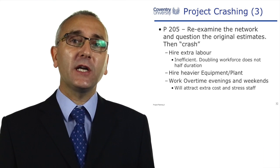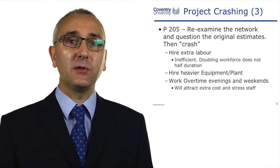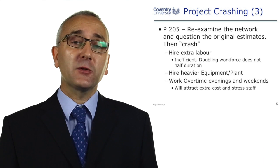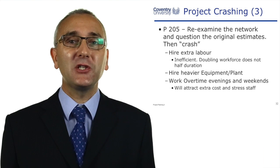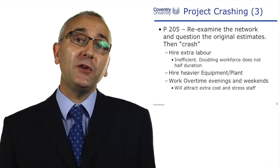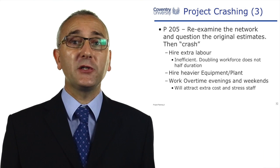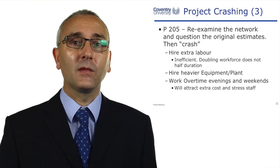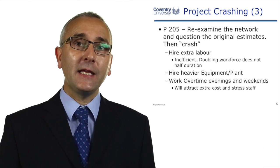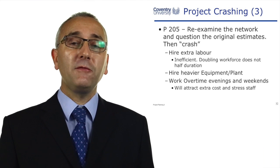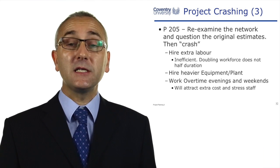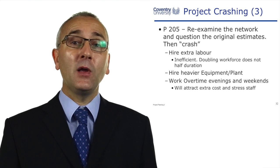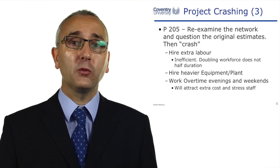Remember our network analysis was based on estimates of durations for the individual tasks — these are only estimates. When somebody says they think it will be ten days duration, it's an estimate. And when you go back to them and say you're on the critical path, they might say they can achieve it in eight days. What Lock doesn't say — but I suggest — is to challenge the dependencies. If you can improve the dependencies by adding more concurrent tasks or adding lead time, you're going to improve the overall project time.